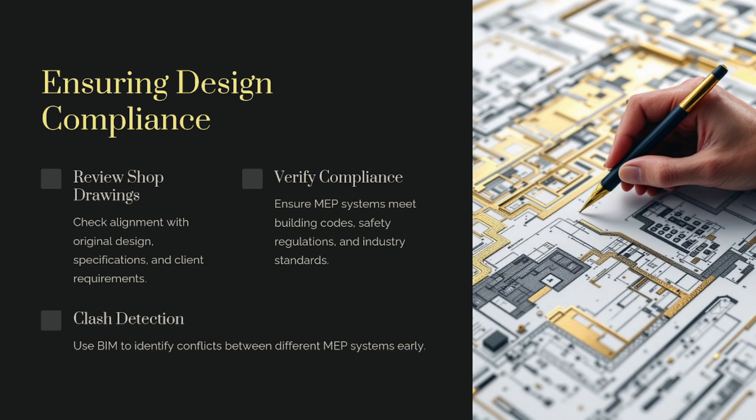The next point is verifying compliance. During installation, as an MEP QAQC engineer, you need to ensure that all MEP systems comply with building codes, safety regulations, local standards, and industry standards. How can you identify these? You need to review the project specifications, material submittals, and material codes — from there you get to know what the codes are for that system.